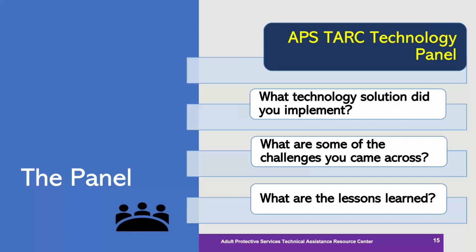We kind of have a workaround in that the developer built in a means for staff to connect directly to either the old system or the new system at the click of a button, to facilitate toggling between both. You would think that with a project like this, you can say, well, we're going to move forward and we won't need to look behind, but you may need to. So don't discard your old data. Certainly archive it, but you may come to a point where you have to be selective about what data you move over, because moving data in itself can be very costly.